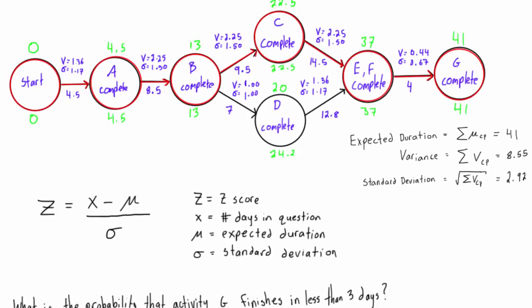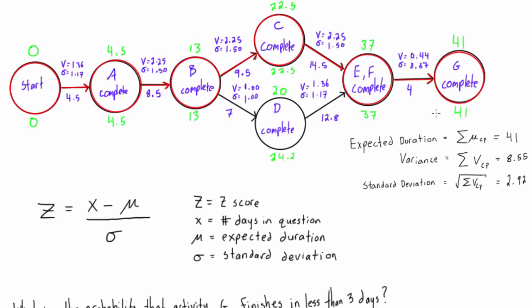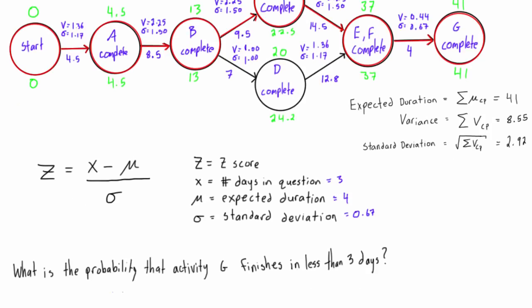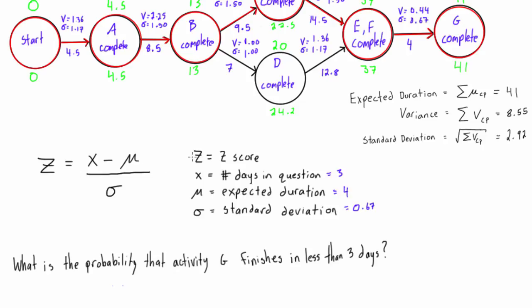What is the probability that activity G finishes in less than three days? We know that activity G's expected duration is four days — we can see that from the network diagram. Its standard deviation is 0.67. In this case we're looking at the probability that it finishes in less than three days, so X will be 3. All we have to do is plug our values into the z-score equation: z equals x minus mu, so we have 3 minus 4, all over 0.67.